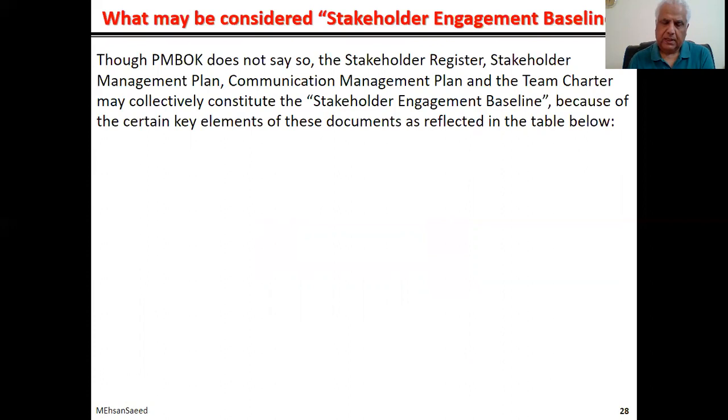I just mentioned that you have to initiate a change request. Change request for what? Change request on some variance. And you only develop a variance, or you only find a variance, if you compare the plan with the baseline. So what is the stakeholder engagement baseline? In my opinion,